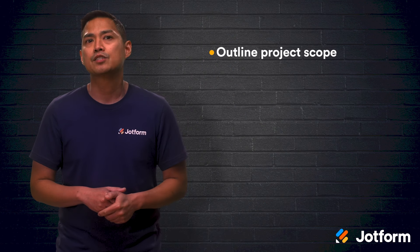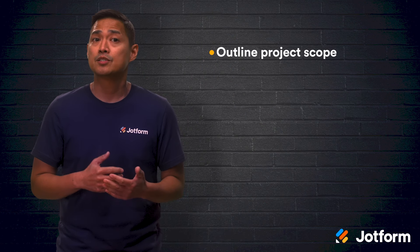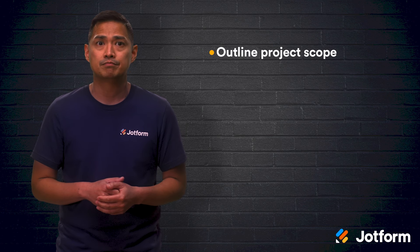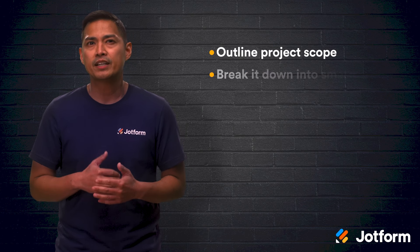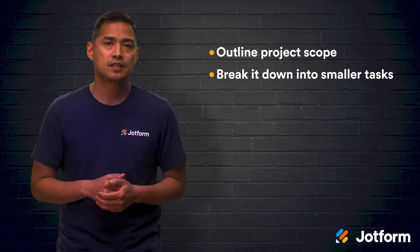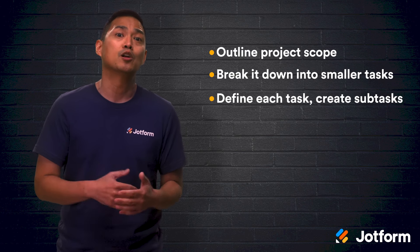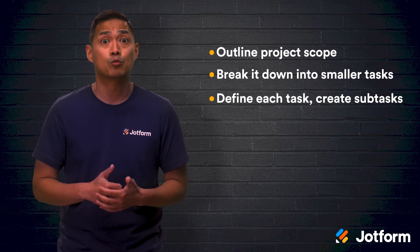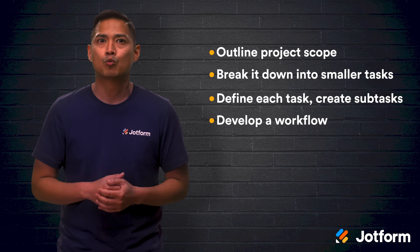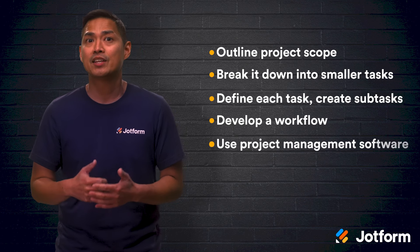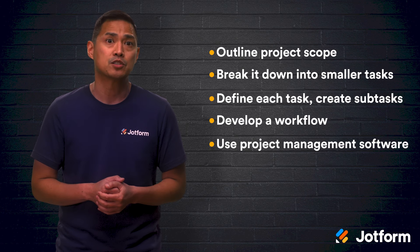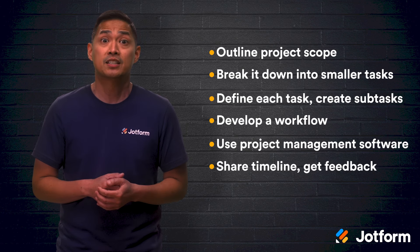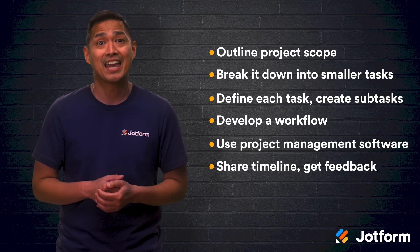Let's do a quick review of the six steps it takes to build a valuable project planning timeline. First, you'll want to outline the scope of your project — this includes the type of project, the due date, and budget. Next, you'll want to break down the project into smaller tasks, and then break those small tasks into even smaller subtasks. This helps you properly sketch the resources required every step of the way. Then you'll want to develop your workflow by creating your timeline, and then enter that timeline into project management software. This way, all your team members can be integral parts of the project every step of the way.